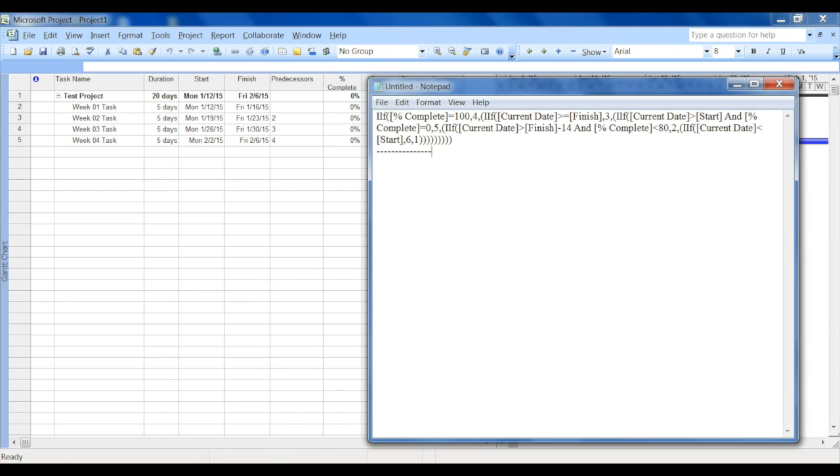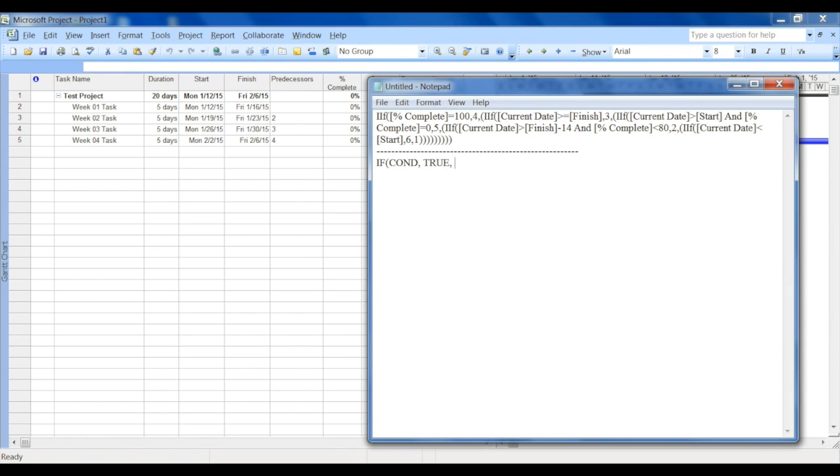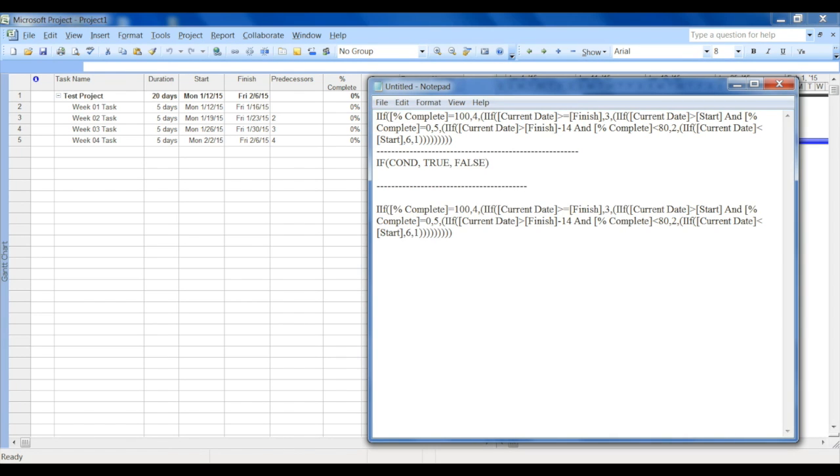In MS Project we have a function with IF condition. The syntax is IF condition, and what should be the value when it is true, and what should be the value when it is false. If we apply the syntax to this, we can break multiple nested IF conditions into smaller pieces.